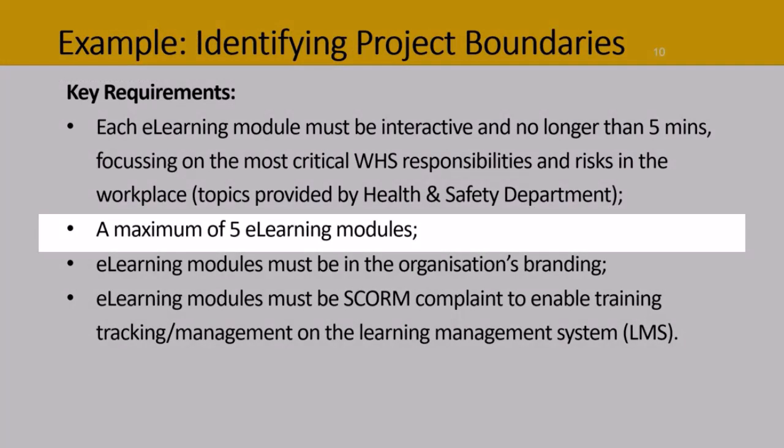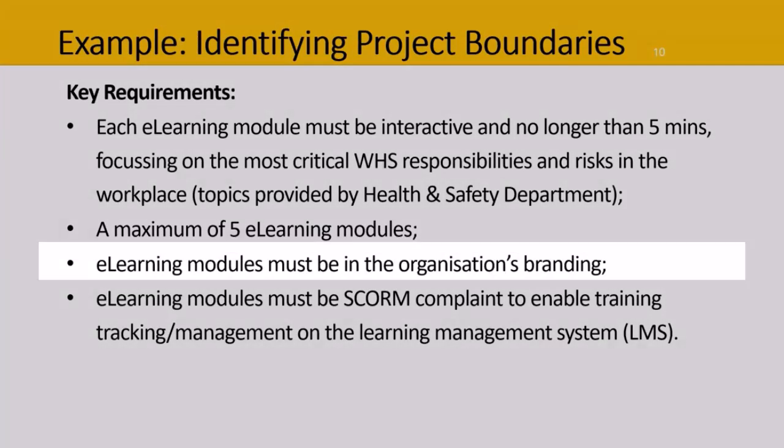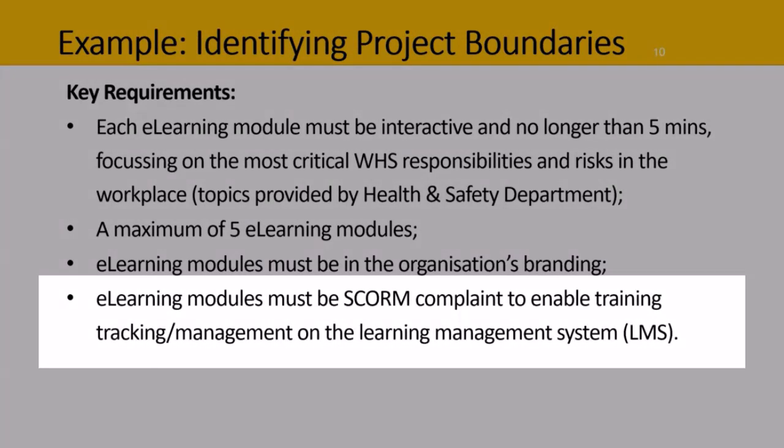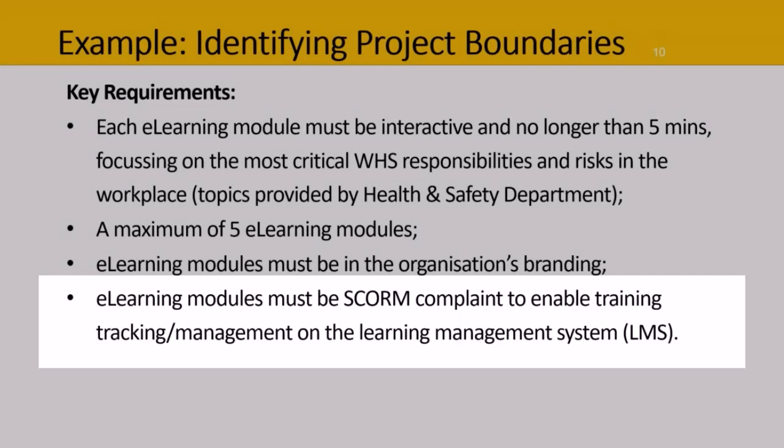There needs to be a maximum of 5 e-learning modules. So maybe everyone agrees that people don't like e-learning and we need to keep them fairly short. And the e-learning modules must be in the organisation's branding. So we can imagine marketing and communications probably insisted on that. And the last one is a technical one, that the e-learning modules must be SCORM compliant. That's a specific standard to enable training to be tracked and managed effectively on the learning management system called an LMS.